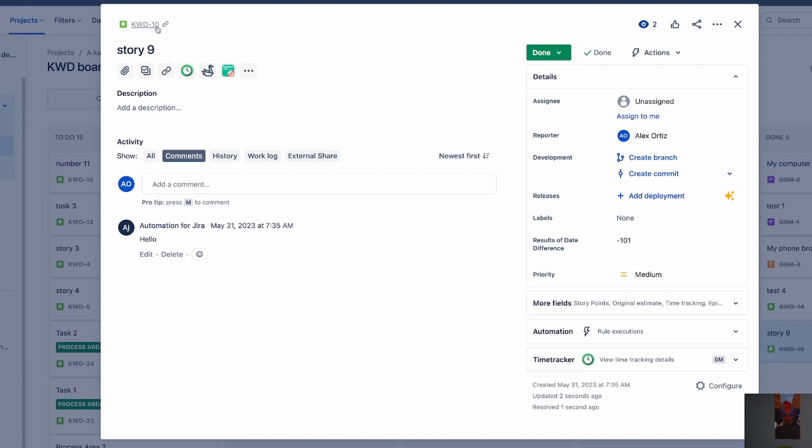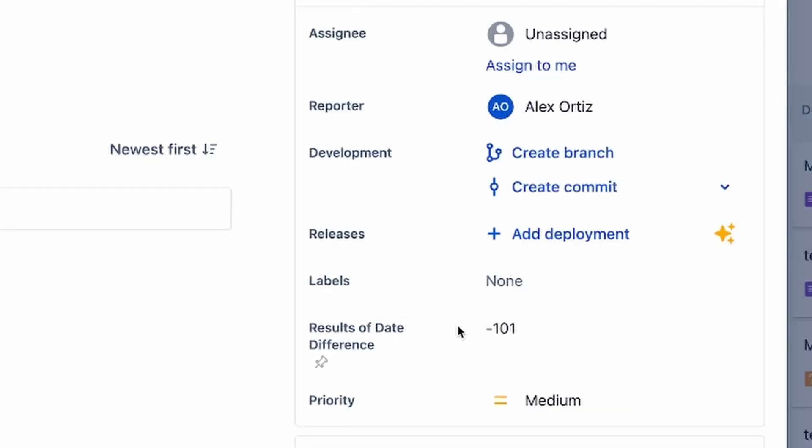Go to the automation rule, click on the audit log, and you'll see a successful run because it was the right trigger — KWD-10 was triggered and edited successfully. Looking at KWD-10, the results in date difference is negative 101. That tells me it's been 101 days since that May 31st date, which I think is very accurate. We now have that cycle time for this request through automation — comparing today, right now, versus when it was created and how much time has elapsed.